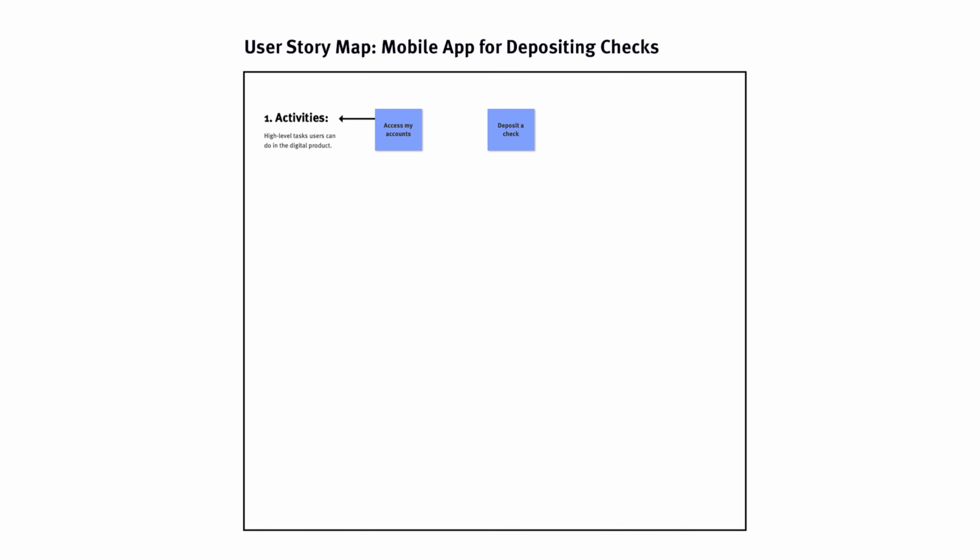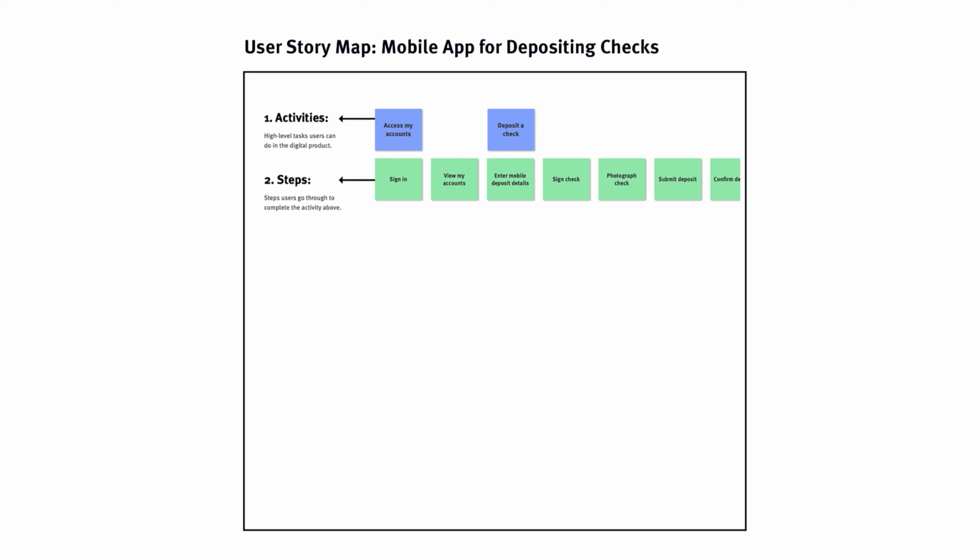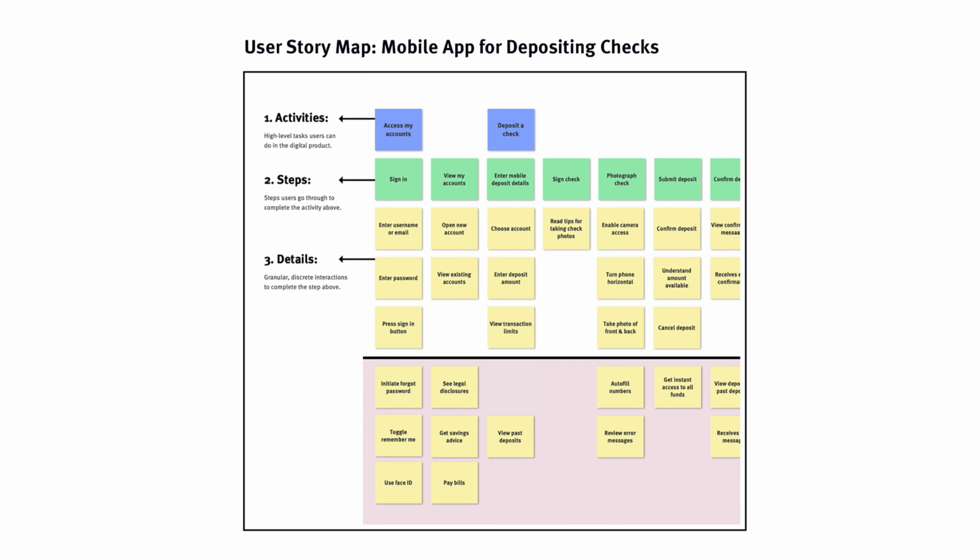A user story map is from the perspective of the product, detailing the steps taken in the product itself to complete an activity, such as checking an account balance, where logging in would be the first step. Story maps are a viable replacement for lengthy requirements documents and provide a high-level input for epics, user stories, and tasks that will eventually feed your product backlog.